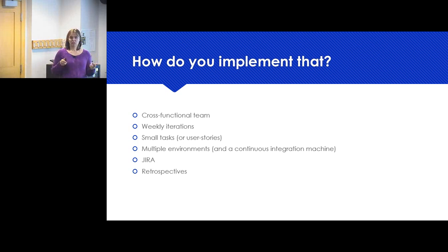And the nice thing is, if you break it down that way, you could stop at adding the table. You don't have to add the interactivity. It's still valuable to the users. They still got that summary information. And you can say, we're getting really close to our release date. We don't have time to add this additional functionality. We can drop that. We still have something that's useful for our users. We're not in the middle of something where we can't release it like this. We try to make sure that whatever we're building is releasable the way it is, so we don't end up in this weird state where we've got something half done and, oh no, we've got to figure out how to hide it.